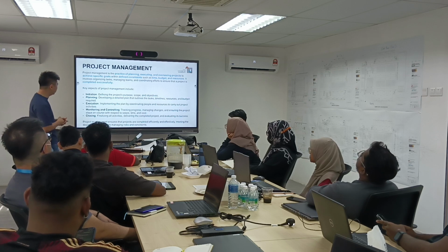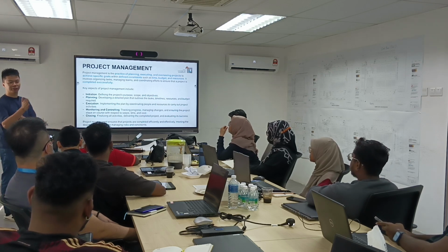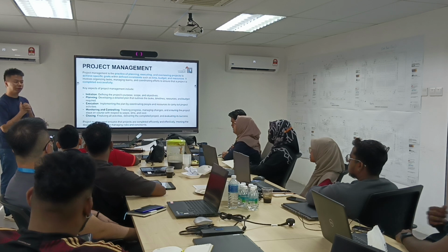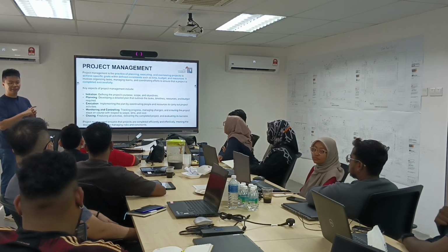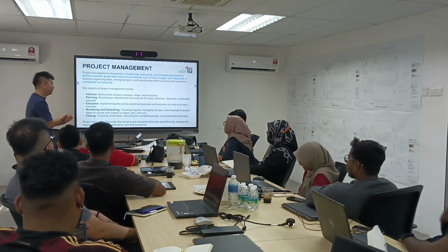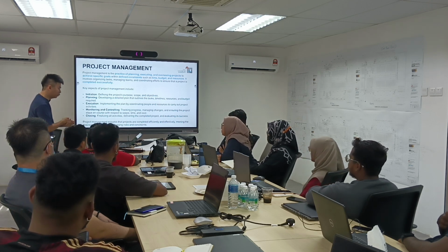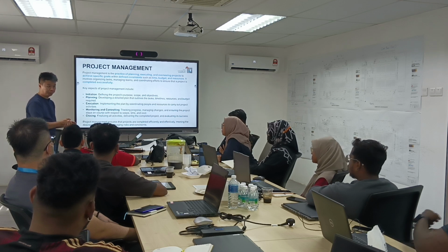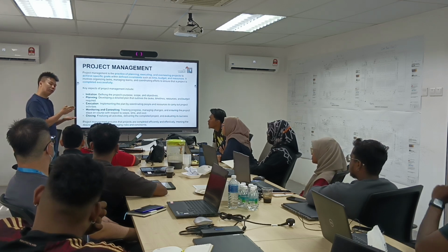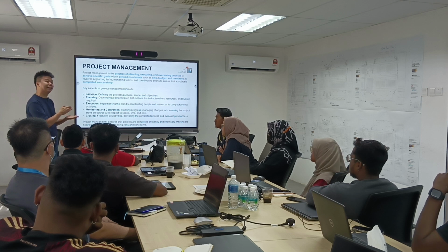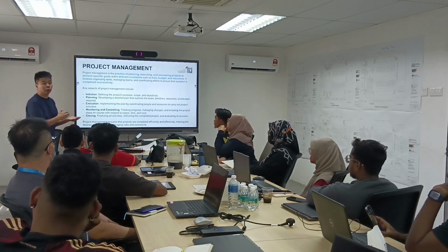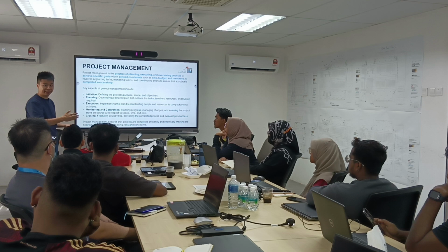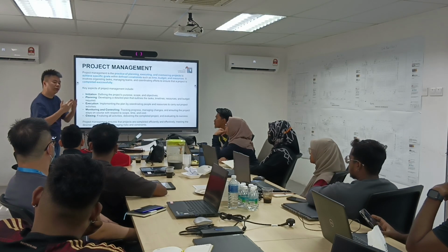Okay, then closing. A lot of us, I think especially Shama, Kartik, Mahin also involved, Atika also involved, Alison and Iqbal also involved. We finished the JDC day 1 in April. But you see, from when we finished until today, we have a lot of things tangling between our customer and us. Means we're still going back and forth, back and forth, back and forth. So this is what I say is not a good closing. We don't have a clear demarcation on when we really hand over the building to the customer.